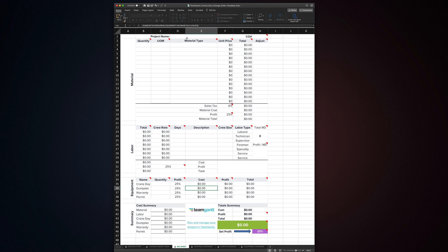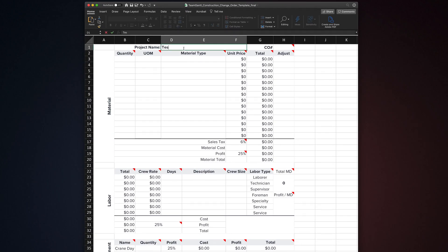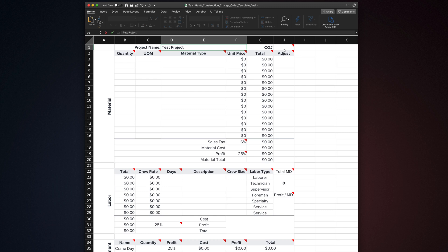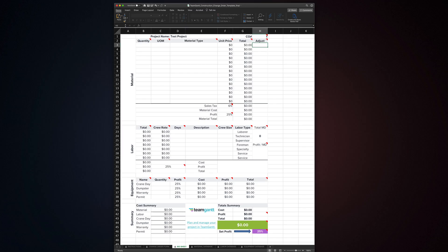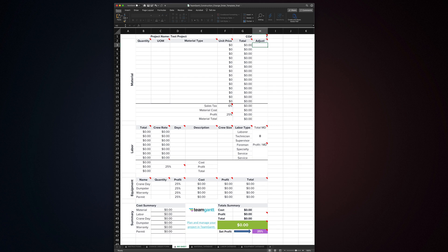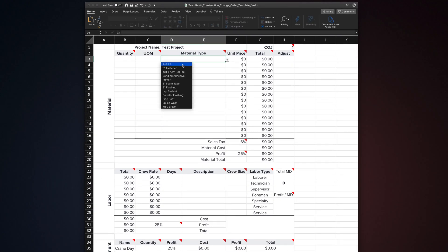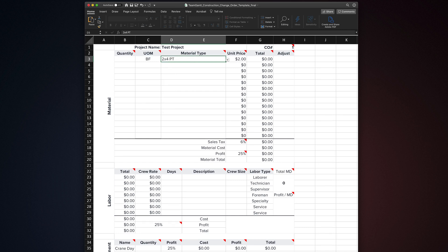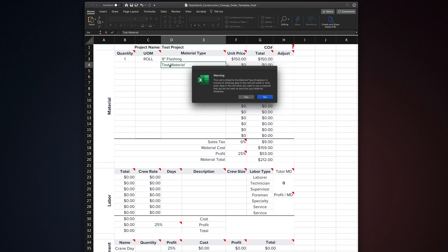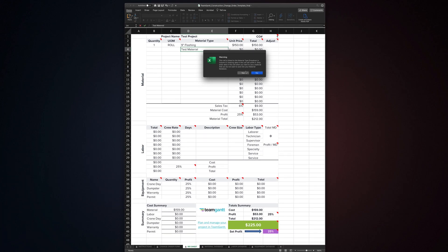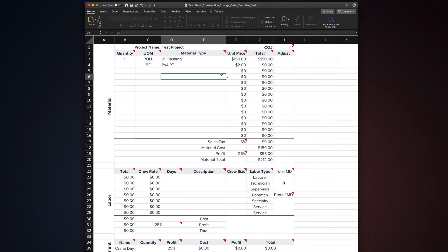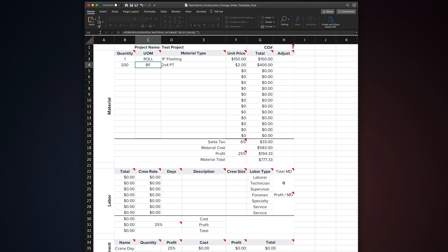What we're looking at now is the bid sheet. It's where essentially all of the work is done once you have your template set up. It's broken down into four sections: material, labor, equipment, and summary. To get started, at the top of the bid sheet, enter the project's name and change order number. When you do, this information is automatically generated on your change order form. We'll take a look at that later. The material section is where you estimate any material needed for your change order. You want to start by selecting from the material type drop-down. When you do, it pulls that item's unit of measurement and unit price from data stored in the material database tab.